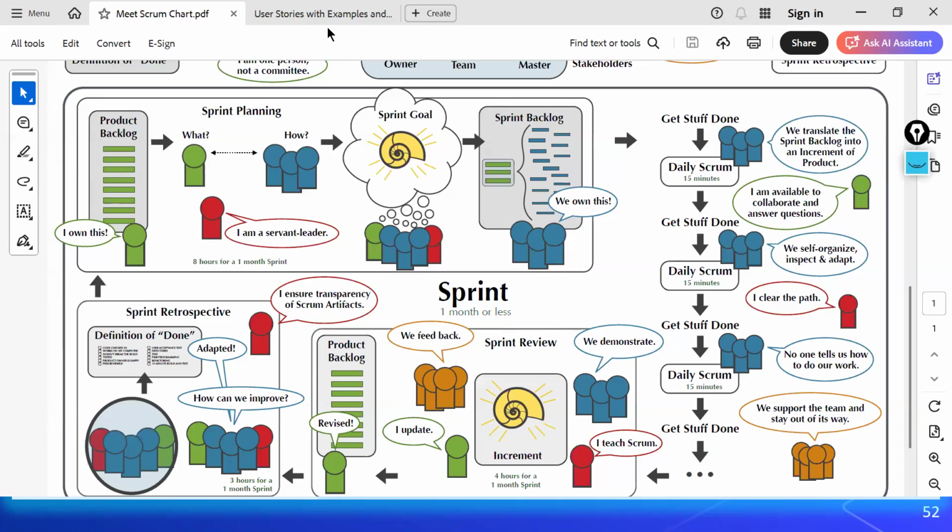In the daily scrum, the scrum master usually goes to each individual developer and asks what backlog items they'll pick for today and how much work is done, basically where we are up till now, or if they have any discrepancies or difficulties, then they talk about it there.